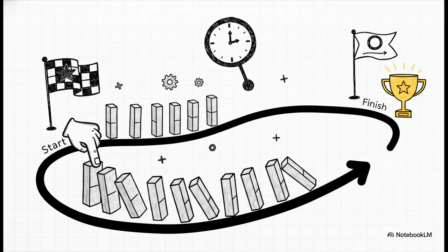So, what does this all mean? The absolutely crucial takeaway here is this. The critical path represents the shortest possible project duration. It is a continuous, unbroken sequence of tasks from day one all the way to handover. If you delay any critical task on this path, you immediately delay your entire project. It is literally the lifeline of your project schedule.